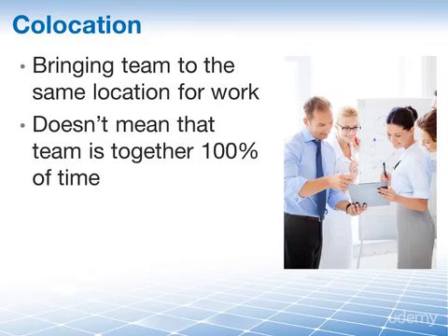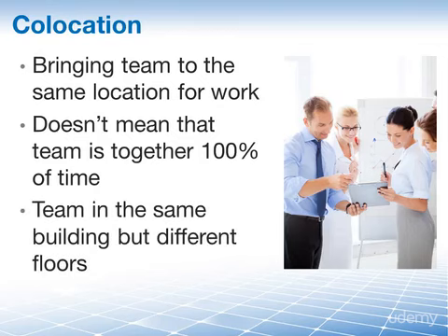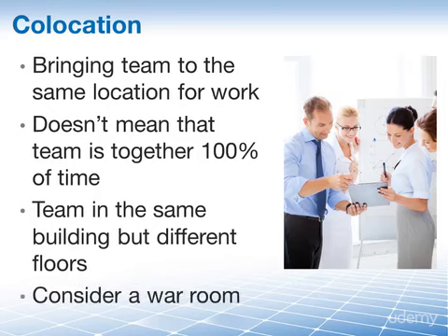However, even if your team is in the same building, well, they may still be on different floors. In this case, you may want to consider what is called a war room. Get a hold of a meeting room and reserve that room for the entire time of your project. That way, you can put up project plans on the walls, photos, drawings, etc., and all project meetings are held in that one room. This is also considered a form of co-location.